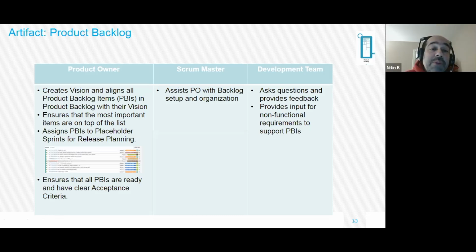Yep, and to supplement what Bob has said, something that helps the dev team members is sometimes called the definition of ready. This is just a joint collaborative effort with the Scrum team members saying, hey, how do we know we can really take this item from the product backlog and move it ahead? Does it have a title? Does it have a basic description? Do we have the acceptance criteria? Do we understand it? There are a few things that everybody can agree on. And as they just start refining the backlog, it moves much quicker.